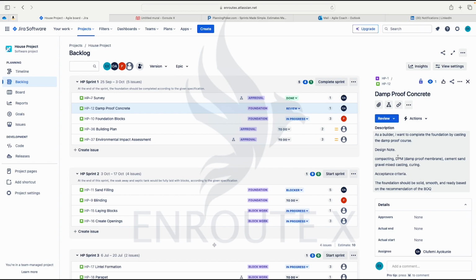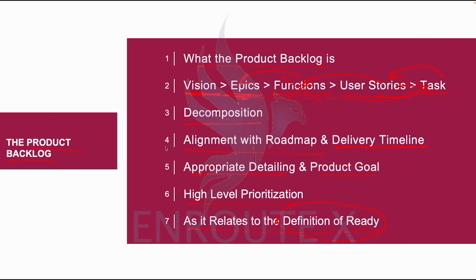The team has capacity to deliver that work in that sprint. Capacity talking about the skill set. The team has availability to work on that story in the sprint. Availability, which means there is a developer that can accommodate that work within that sprint. So all this come together to meet the definition of ready. If you need to have a quick catch up on definition of ready, please go again to the sprint planning and the backlog requirements classes that we took earlier.